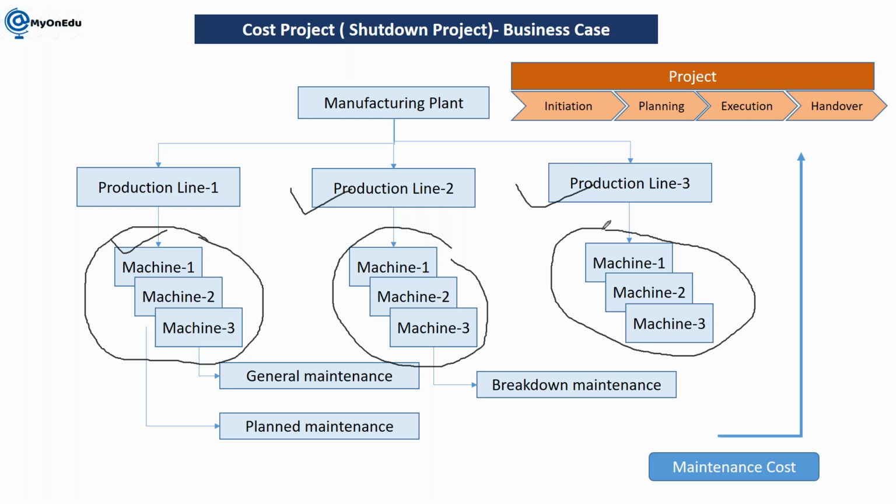So in that case, we can have a project where we can analyze all individual maintenance requirements and schedule them. Whatever cost is going to be incurred on the maintenance, let's say if you are changing any oil, any screw, any small item, in that case it will be considered as a cost, not as an additional investment.